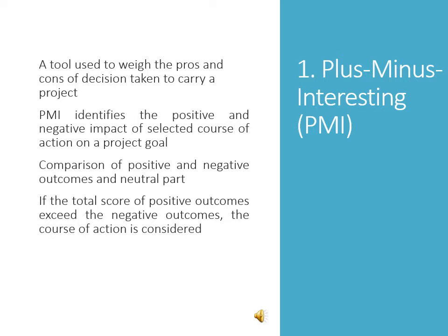It is a valuable tool used to weigh the pros and cons of a decision taken to carry out a project. PMI identifies the positive and negative impact of a selected course of action on a project goal. We can compare positive and negative outcomes and the neutral path. If the total score of positive outcomes exceeds the negative outcomes, the course of action is then taken.